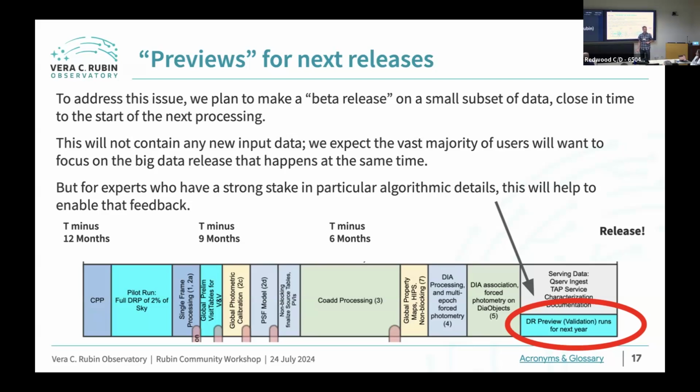So roughly speaking, is the code for this DRP run frozen at the left-hand edge of this block diagram? We sort of progressively freeze the code. You need to freeze the code for single frame processing earlier, potentially take changes to coadds later, but you don't want to be doing massive changes later. You want to be on a convergent path. I think Francisco had a hand.